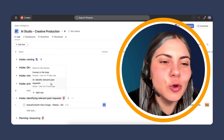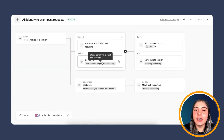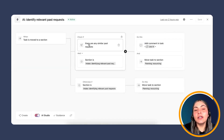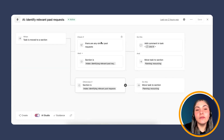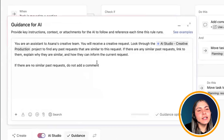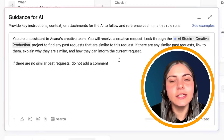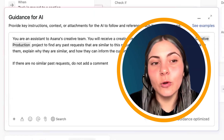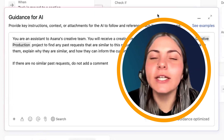This rule is simpler but can be customized further. Whenever a task is moved to the 'identify relevant past requests' section, it checks if there are any similar past requests. If so, it posts a comment using AI and moves the task to the planning and resourcing section. Otherwise, it just moves the task to the next section. In the guidance, we tell AI: you're an assistant on a creative team; you'll receive a creative request; look through the project for similar past requests; if found, link to them in the comment, explain why they're similar, and show how they can inform the current request.